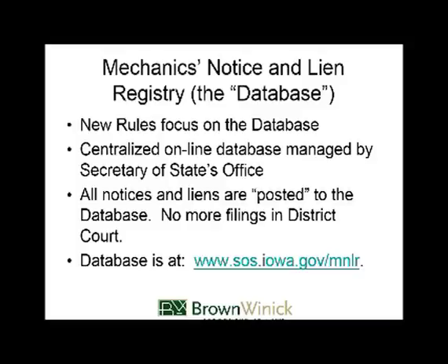It's a web-driven system. And before, where everybody would file their liens in each county, giving you 99 counties where things could be filed, we now have one centralized location where people can look to see if liens have been filed and to see if certain notices have been filed. So liens are no longer filed in district court.